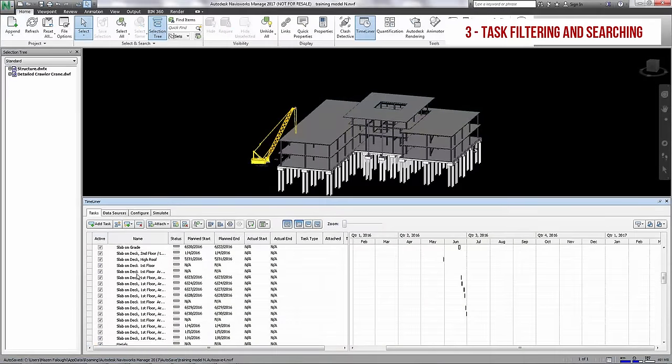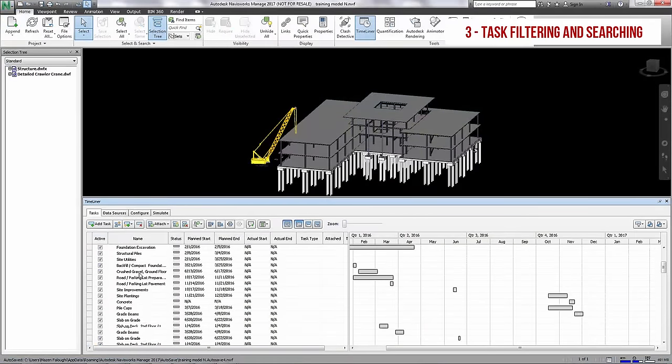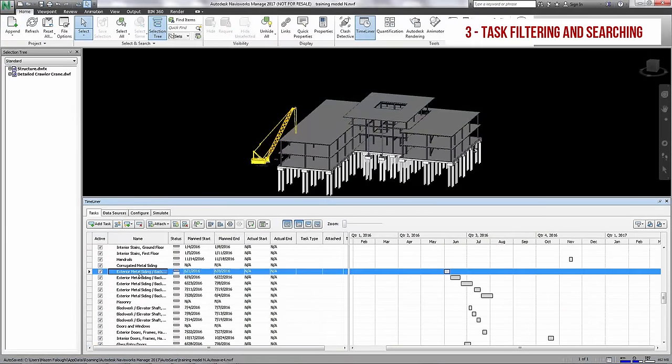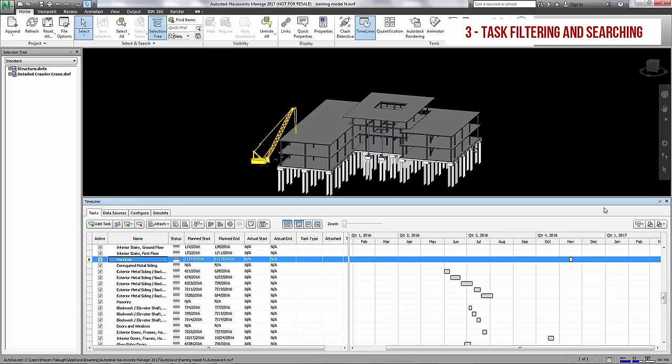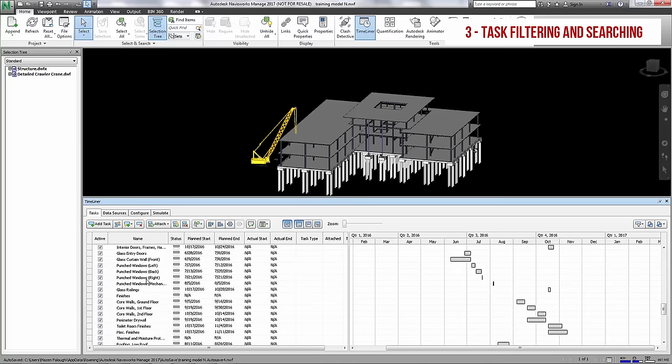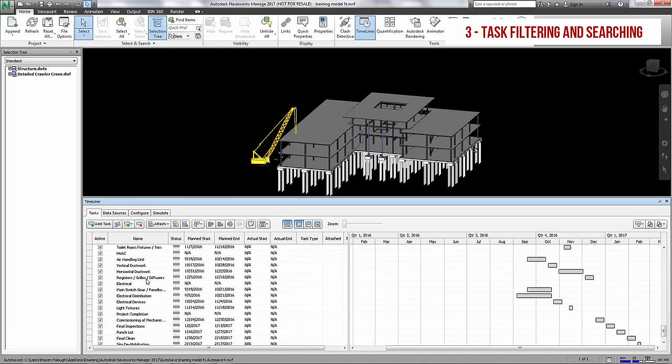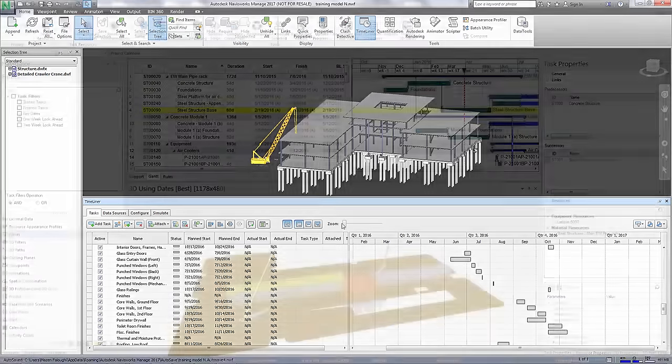However, you can only filter the schedule by task status in Timeliner, which is not very effective for managing future activities or looking out for potential project complications. This, and the lack of a search functionality for activities, cause a lot of scrolling and frustration for the user, especially at the early stages of the project.